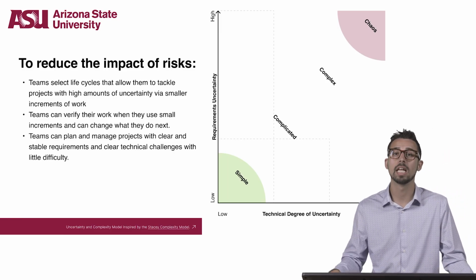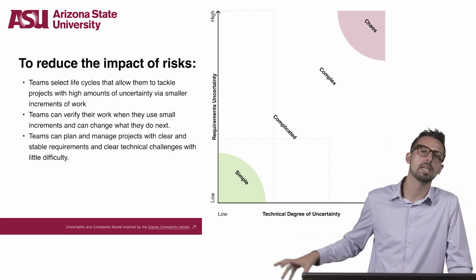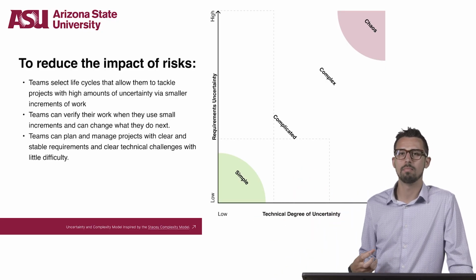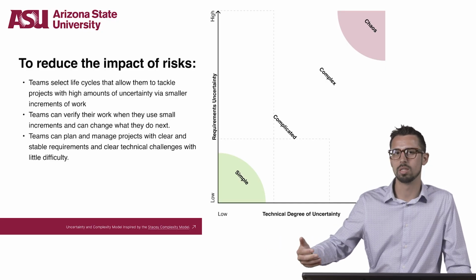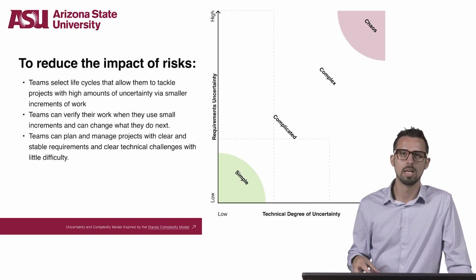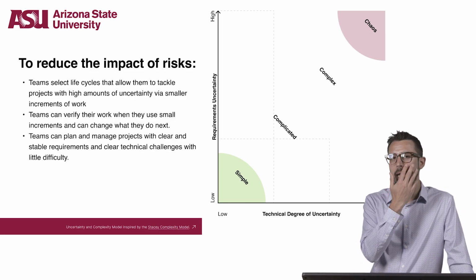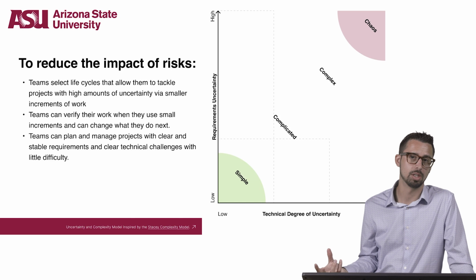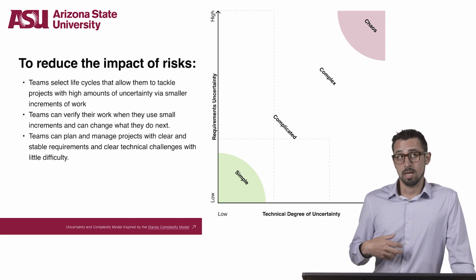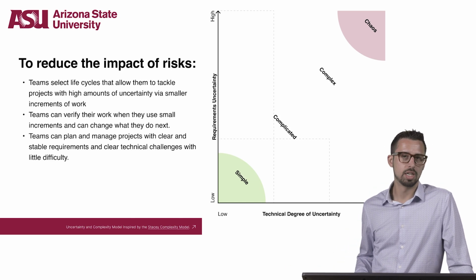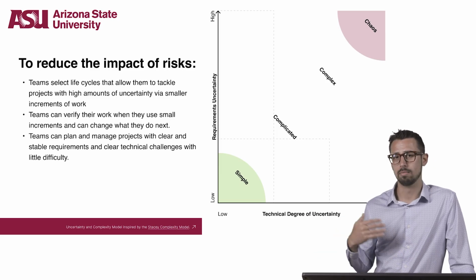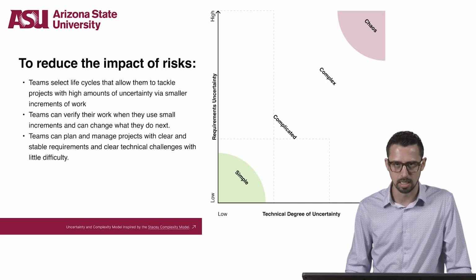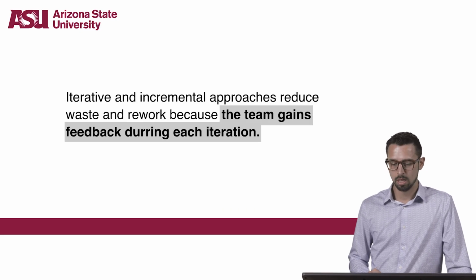Teams can also plan and manage projects with clear and more stable requirements and clearer technical challenges with much less difficulty. However, it is important to note that as the uncertainty of the project increases, the likelihood of changes, wasted work, and potentially even rework also increases, which can be very, very costly and time-consuming.